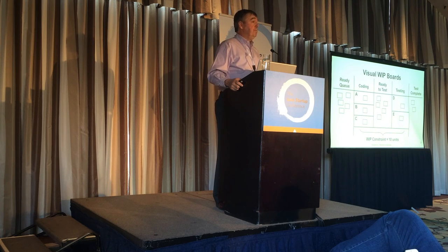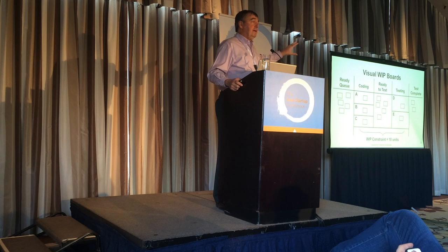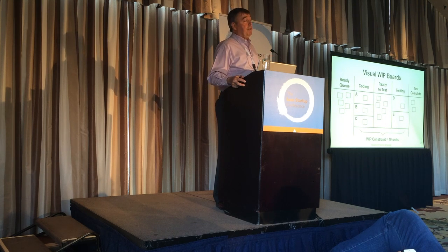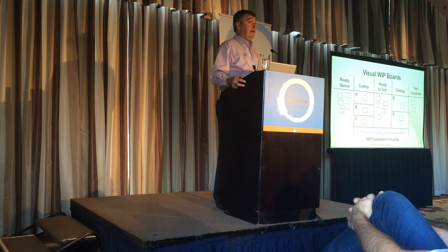Why is it so important to know what state the work is in? Because that tells you where the queues are, and the queues are determining what the cycle time in the process is. And for the first time, when people are monitoring the amount of work, the congestion in the states, they're getting visibility on where the emergent queues are in their process. I could give you 10 Gantt charts up on a board and ask you, do we have a queue in testing? You would have no clue. I could put up a board like this and you would instantly know that the queue had doubled in 24 hours within that process.